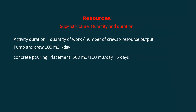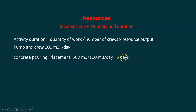For the superstructure, we have two spans and every span has around 500 cubic meters of concrete. We still have the same batching plant and pump which can do 100 cubic meters a day. That means I will divide 500 — which comes from the design drawings, FSE, or shop drawings — by 100, giving five days in each direction to place the superstructure.